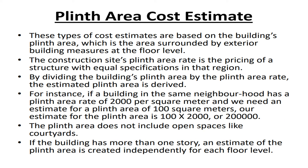Plinth area cost estimate: These types of cost estimates are based on the building's plinth area, which is the area surrounded by exterior building measures at the floor level. The construction site's plinth area rate is the pricing of a structure with equal specifications in that region. By multiplying the building's plinth area by the plinth area rate, the estimated plinth area cost is derived.